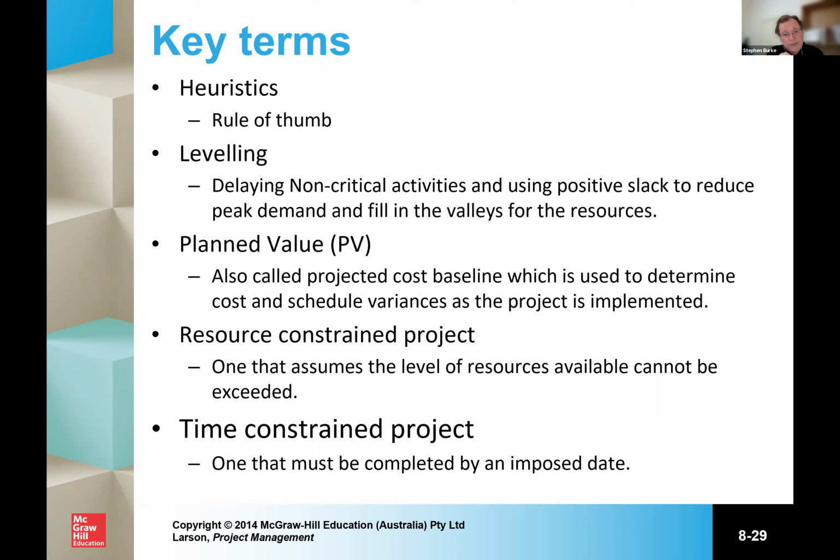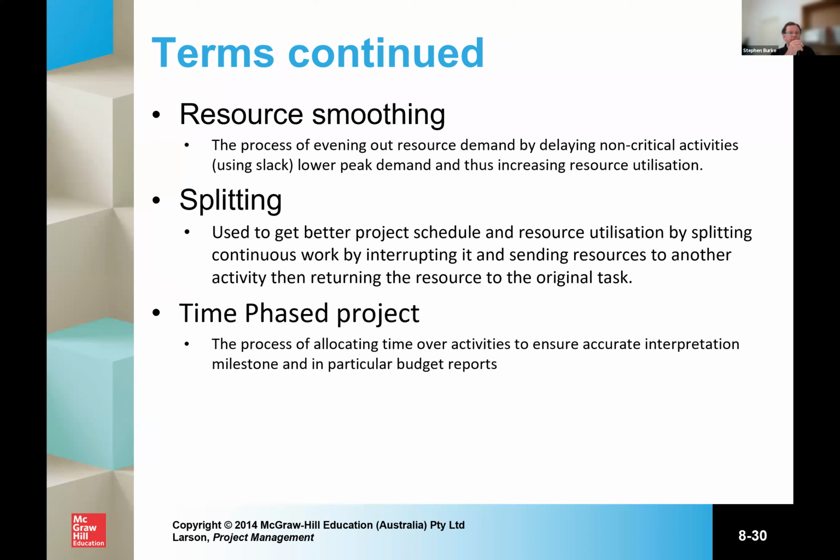And if your project is time constrained, it must be finished by an imposed date. I think probably most of us are used to working with time constrained projects, particularly in public buildings and that sort of area, or in technology. We use the term resource smoothing, which is the process of evening out resource demand by delaying non-critical activities using slack, to lower peak demand and thus increase resource utilization.